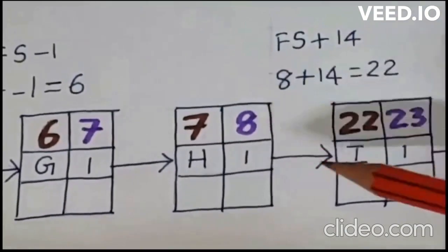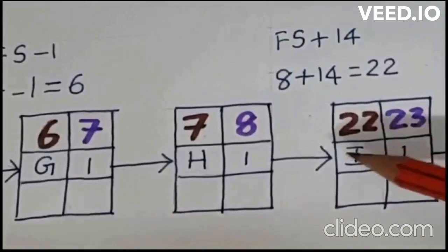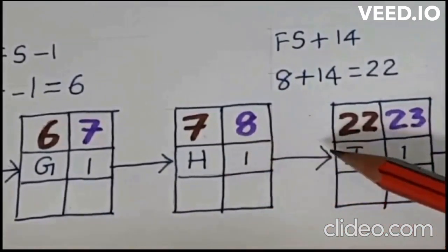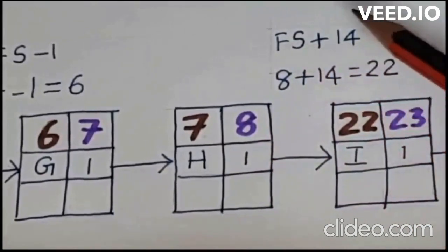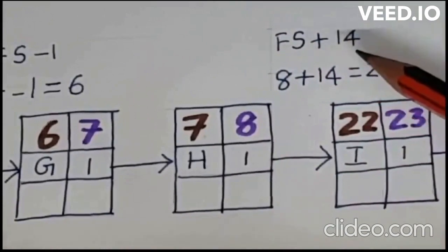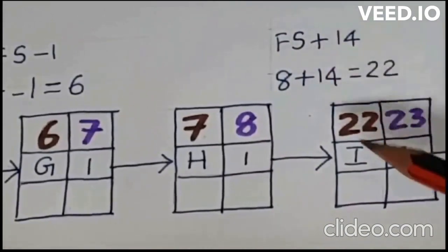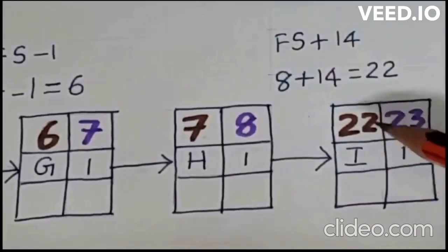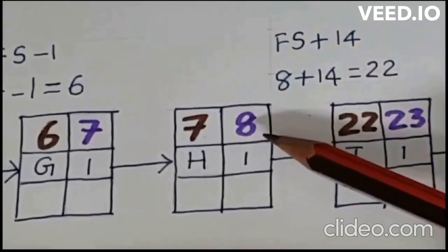Now moving on to the next activity, I. For activity I, H is the predecessor, but there is a condition in finish to start. There is a lag of 14 days. Finish to start plus 14. That means activity I should start 14 days after activity H finishes. That is the actual meaning.